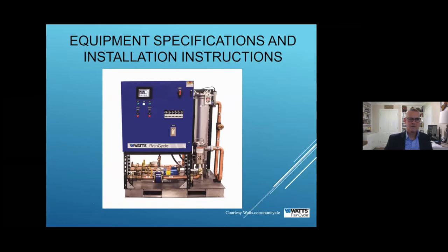Most of this stuff is an online PDF now, to provide that information way up front. Make sure it's available when the inspector shows up on site. So you're submitting it when you're doing the permitting application and plan review application, and you're keeping a set on site for the inspector and the owner as well, and the installer, to maintain the systems for the duration of the building.